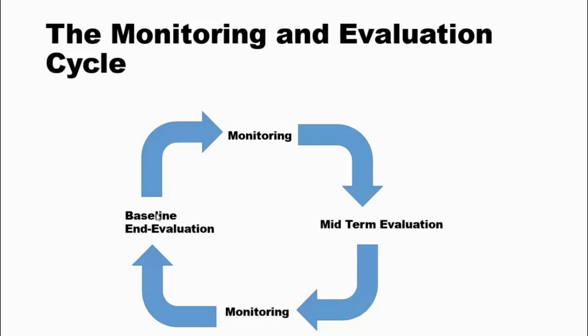Others may argue that there may not be any need to do a baseline because all the indicators are at zero. Okay, but it's not always the case. It really depends on the indicator that you're using. Usually indicators that have to do with number of trainings conducted, yes, those are zero value indicators at the start of the project.